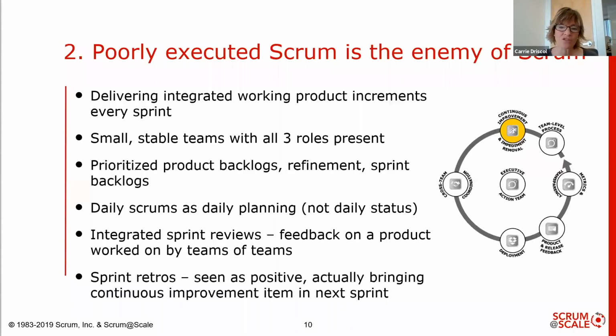Basically, if you are not following the Scrum DNA, if you don't have the 3 roles, are not doing the 5 events or utilizing the 3 artifacts, Scrum's 353, as well, if your teams are not delivering potentially shippable products at the end of every sprint, chances are that you are not executing Scrum well, and you would need to look into ways to descale prior to scaling. Remember, you only want to scale the good practices so that you can more successfully reach your business goals faster, whether they be speed to market, customer satisfaction, or all in, raising your overall company valuation.